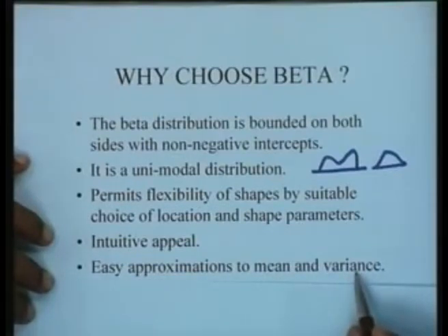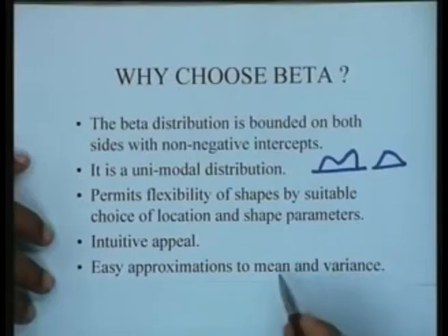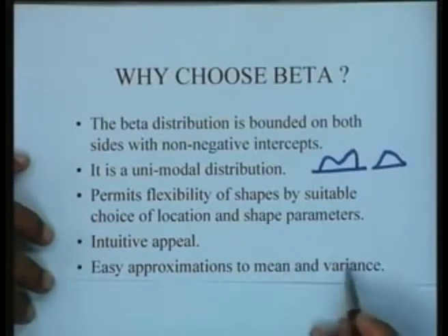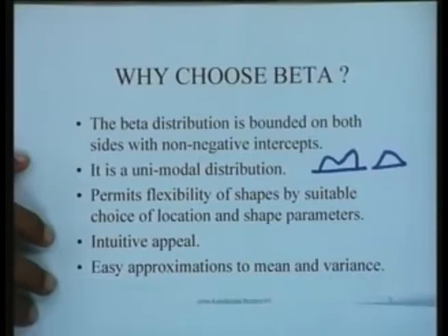The two formulas that we just mentioned for computing the mean and the variance can actually be derived as very simple approximations of the true values of the mean and the variance from the properties of the beta distribution, and these formulas are very convenient to use or adopt in practice.